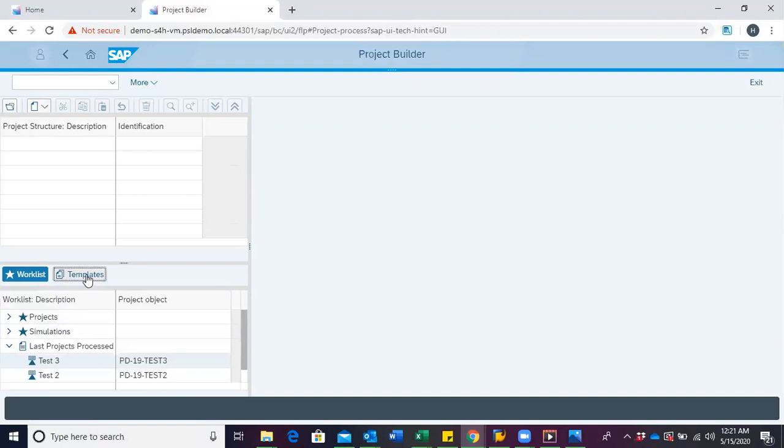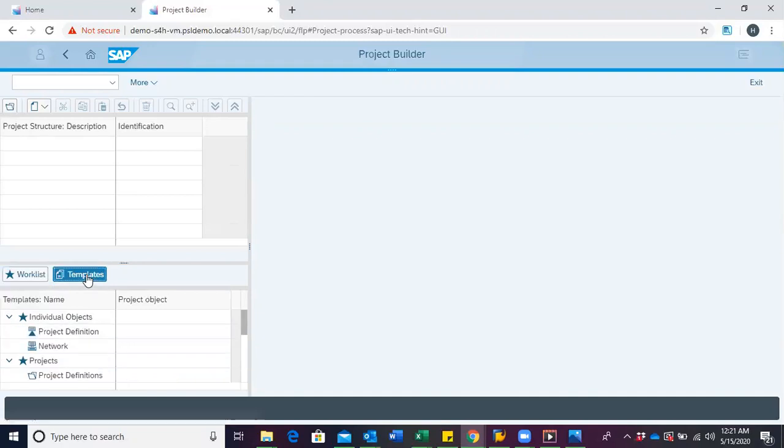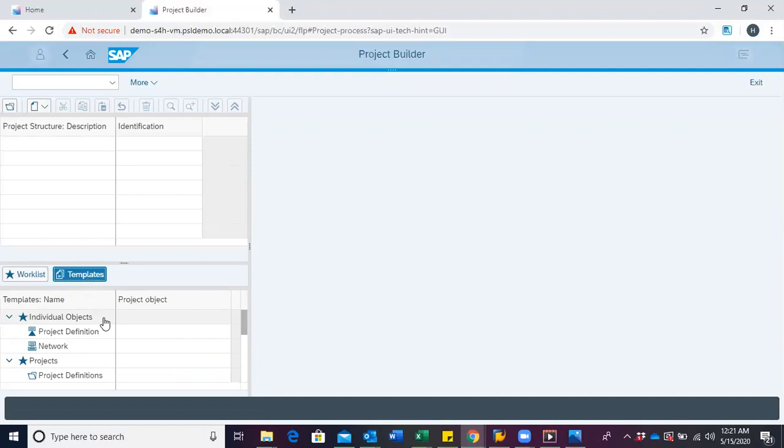A template area presents us with individual objects such as the project definition, WBS, network material components, etc. These are objects that can be used to create a project.